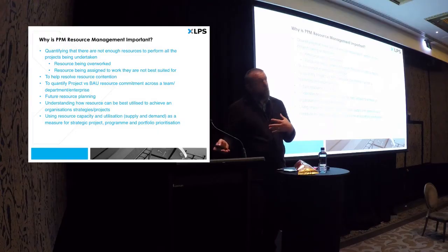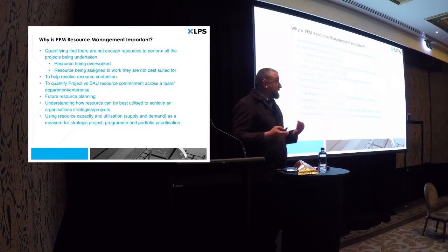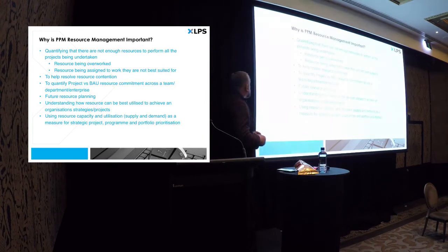So some specific areas that it can help us, and that term quantification I guess is really the key term, because we know there are going to be resource issues with any project or program, potentially. Quantification, be able to give clear and accurate data about where those constraints are, where the problems are, what future force planning we need to do, where our shortfalls are. That is one of the key elements of the resource management component of a tool like this.